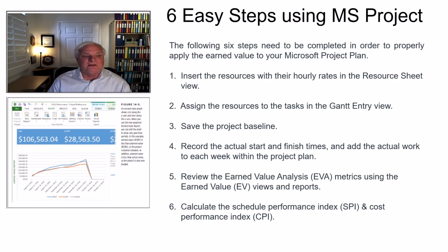You can see that it actually shows Microsoft Project's view for EAC, ACWP, and BCWP, and it predicts those 3 on a trend line moving across time. So ultimately, when you're working on a long project being 30, 60, 90 days, a year, you need these data points to see where you're at, because you have different work packages that were supposed to be completed at different points in time. This gives you the ability to see where you're tracking cost-wise versus where you need to be.